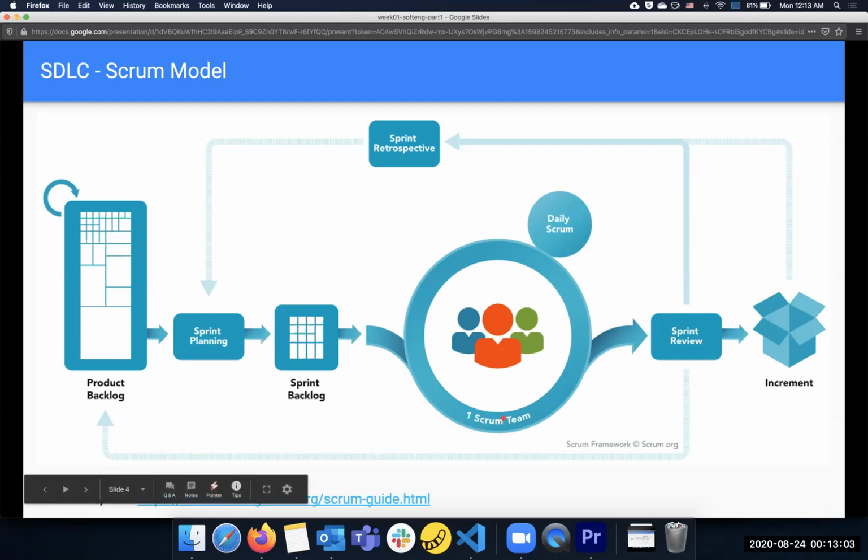And then the team, it's called a Scrum team. There are different roles. We'll get to this a little bit later. And they will hold daily meetings called daily Scrum meetings, or sometimes called stand-up meetings, because the team members, if they're physically together, would be standing up so that the meetings will be very short. The recommended length is no more than 15 minutes. So it's very short. Essentially, you answer 3 questions. What did you do yesterday? What are you gonna do today? Do you have any roadblocks? So that the other members of the team can help you remove them, so that you can move forward.